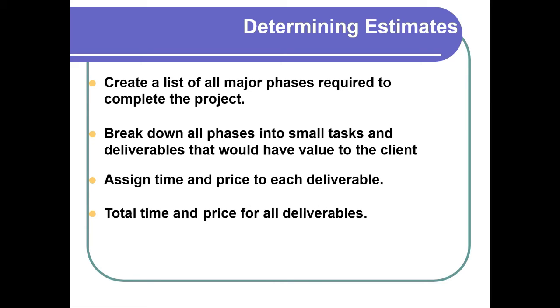Then I multiply that by the number of hours it's going to take to do that, and then I add it all together. I add in any external expenses. Maybe I have a translator, or maybe I have ongoing software cost, or maybe I'm buying stock art just for this project, and I can charge that to the client. Maybe I can't charge it to the client, depending how you write your contract, and boom, that's your price. Then you write that up and you give it to the client.